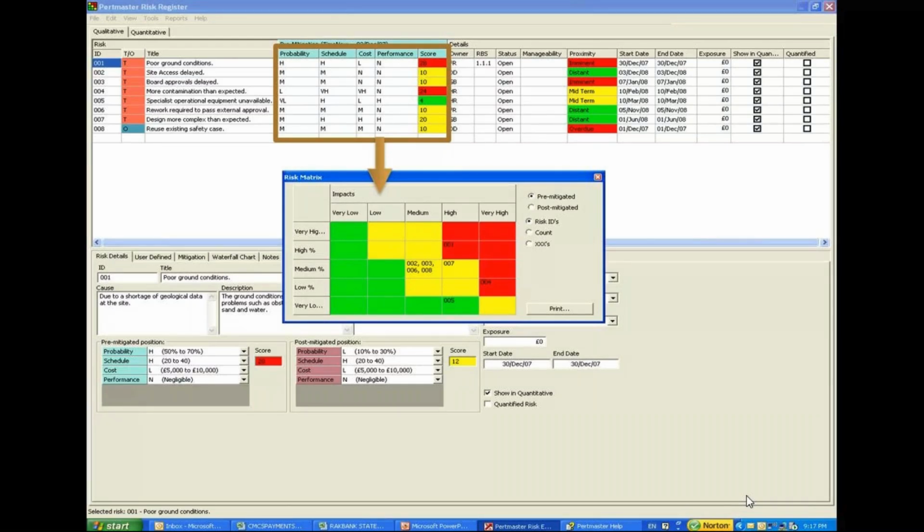So what it means is we have pre-mitigation positions wherein you have the scoring mechanism and other things done. Then we go for post-mitigation. In between, we also add the mitigation plan. Then we go for post-mitigation, and in both cases we just see whether we are able to achieve the objective, and if it is achievable, then we go for taking it to the quantitative analysis wherein we are going to analyze the impact of these risks on our various objectives of the project.